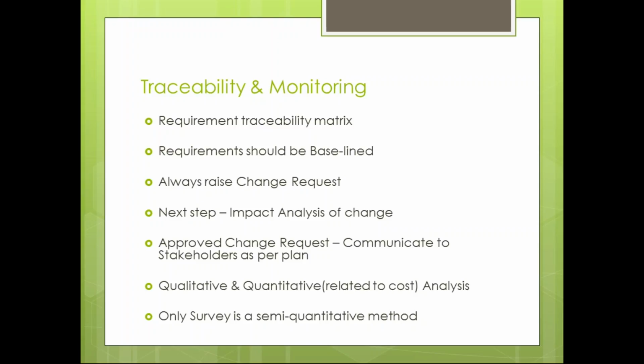So we do not go by that. Based on the processes defined in these books, it is very much recommended to raise a change request in all such situations where requirements are baselined. Questions might try to deviate you from your answer, but the first step will be to raise a change request, because you never know, any impact might surface later in the project, and it might be very risky.